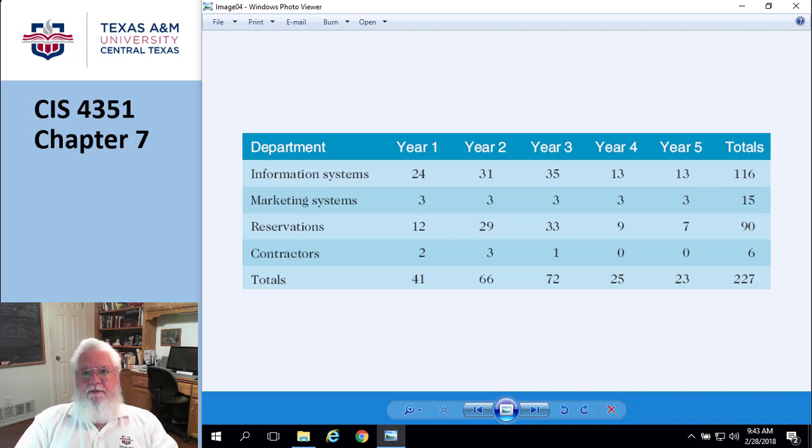Okay, welcome back. We're on page 276, going through the bullet list of the cost estimating tasks for this case study. So we just finished talking about training. If you're going to hire somebody to come in and do some training, that's a direct cost. But the people who normally would be doing their job are now in training. That's an indirect cost. In this particular project, they decided to do a 20% reserve because it was the application of a new technology, and they weren't absolutely positively sure everything was going to work exactly right.